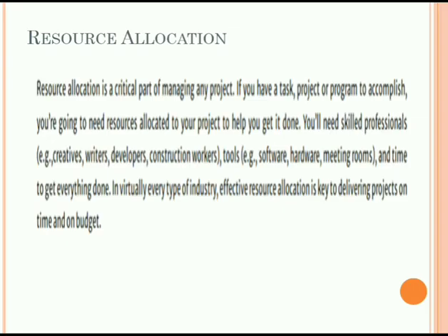However, apart from the widely used critical path concept, project managers use fast tracking and crashing if things get out of hand. Fast tracking performs critical path tasks in parallel, and the prominent feature of the technique is that although the work is completed sooner, the possibility of rework is higher. The crashing technique refers to assigning resources in addition to existing resources to get work done faster, associated with additional costs such as labor, equipment, and a number of other costs.